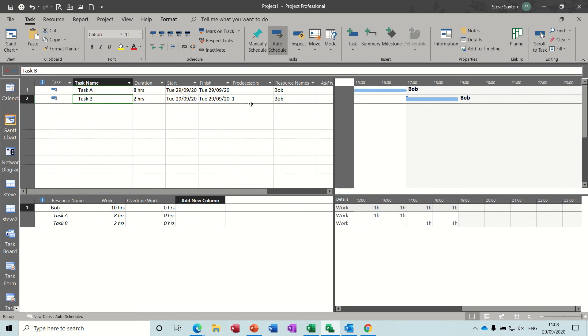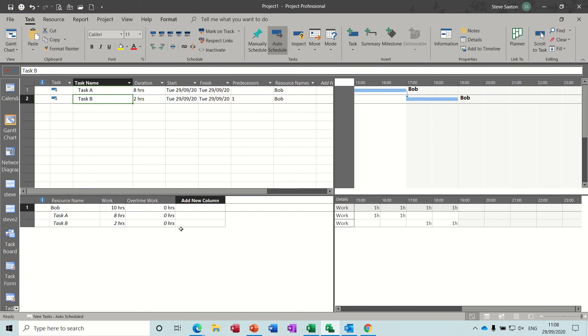So that's two different ways of doing it. If you are one of these people that like the visual Gantt chart to look correct, which I am, that is probably the option that you want to do. And obviously, I did that for the whole week, and that would be every week. That's the downside, so that would be every week that you'd be working 10 hours a day. If that's okay, that's fine. Otherwise, you're going to have to do it on a single basis the other way I showed you.